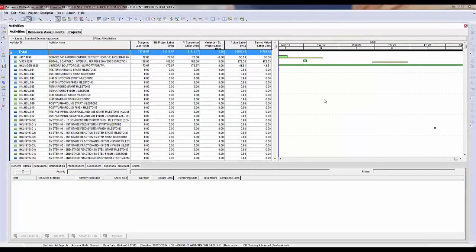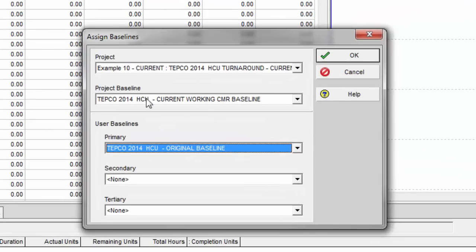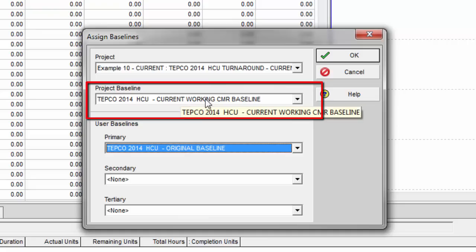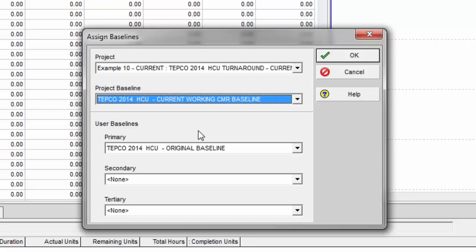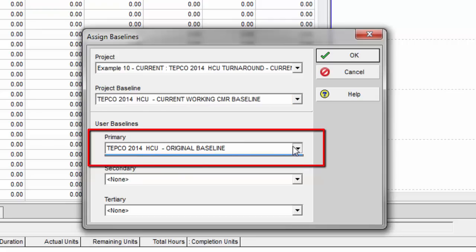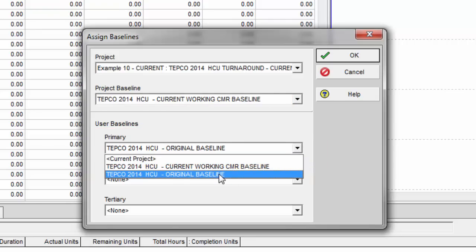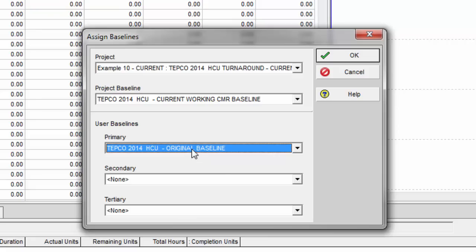Before showing the reports, let me show a couple things about this project file. I'll go to Projects, then Assign Baselines. The project baseline is set as the current working or change management request baseline. The primary user number one baseline is set as the original baseline, which we do not touch or edit. So we have two baselines assigned: the change or working baseline as the project baseline, and the original baseline as the user primary baseline.